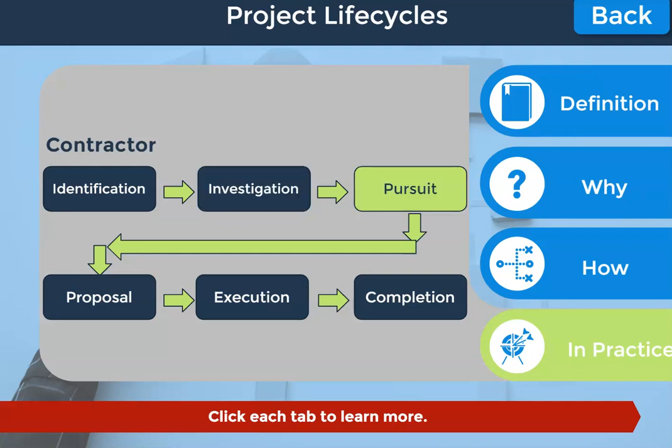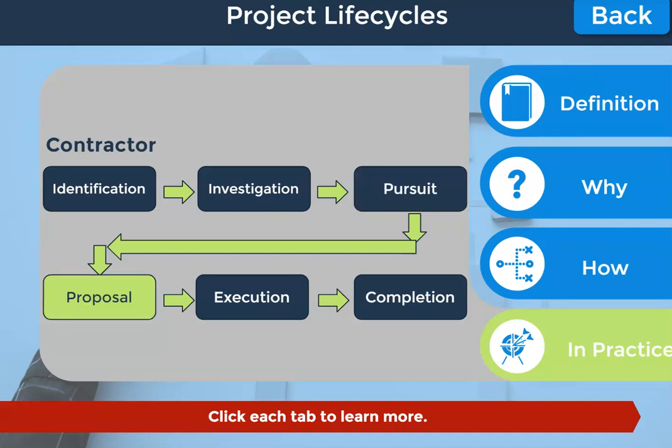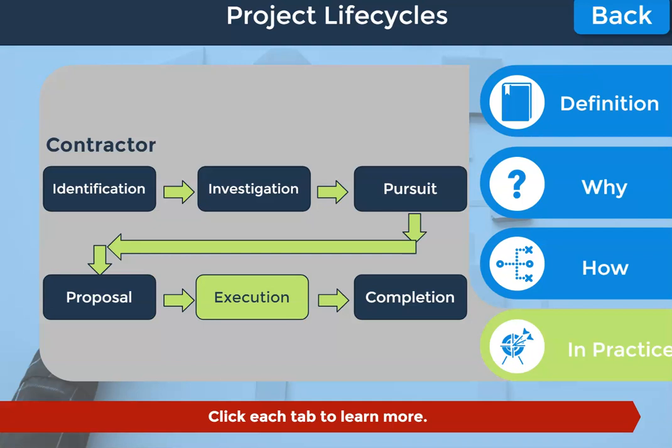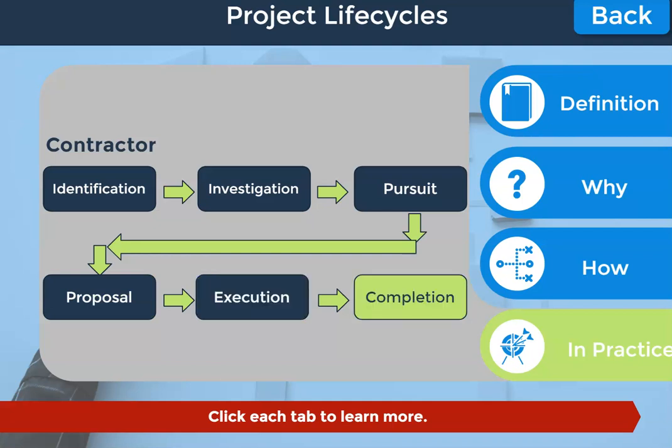The contractor responds to any request for information whilst seeking to favourably influence the client and refines the business case. Then the contractor prepares and submits their proposal. If selected, the contractor negotiates and accepts the contract and carries out the project. These examples could be used to deploy projects and programs for industrialization where there is a definite need to understand client and contractor relationships and project delivery.